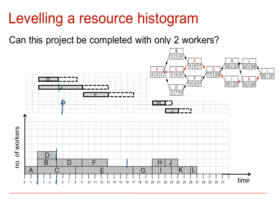What will happen is that F will now come into this new position, and D starting at 5 and having a duration of 7 will finish at time 12. So we've now literally levelled the resources so that D is no longer in its original position, but by starting 3 hours later we only require a maximum of 2 workers for the whole project. That was possible because D and F could both move within their float times.